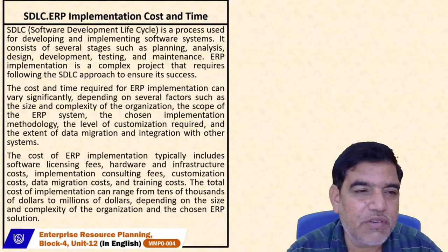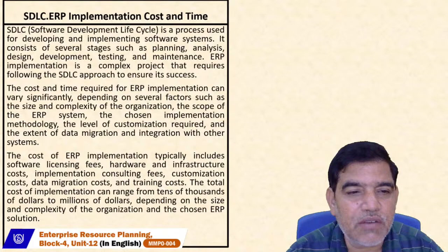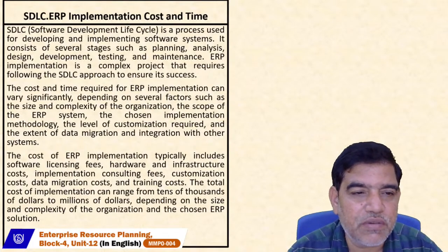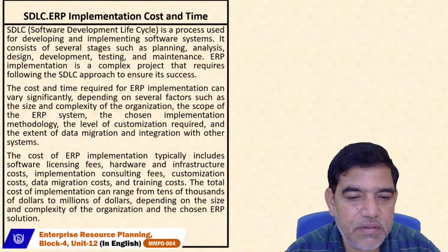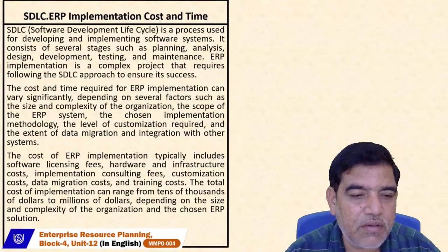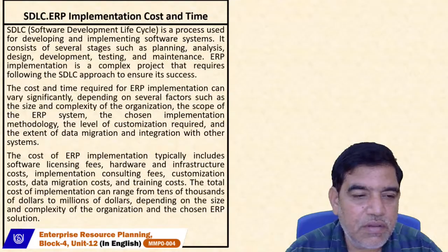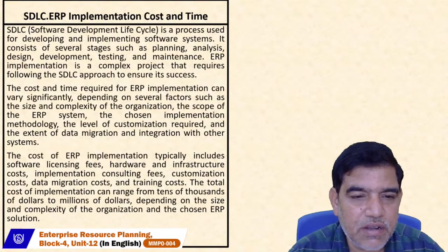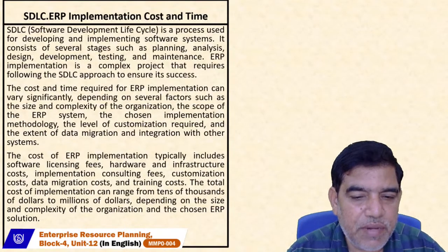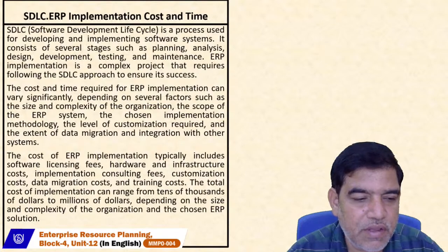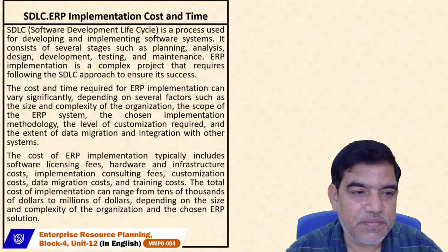So if the time is required, then it is required to calculate the total cost to develop the system based on the resource allocation, training cost, data migration cost, customization cost, licensing fees, and hardware infrastructure cost. All the costs have to be calculated, and that depends upon the size and the complexity of the ERP system.